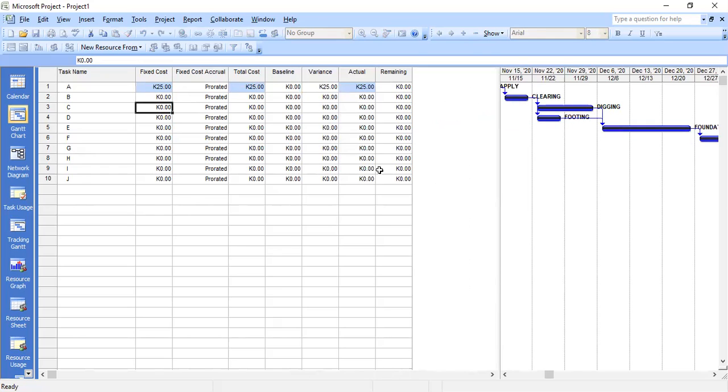So it's just 20 kwacha there. And then what is the baseline? Let's set the baseline at 50, right? What you planned was 50 kwacha for this activity, and the total cost of this activity is 25, and what is on the paper is 50, so subtract 25 from 50, you get this.